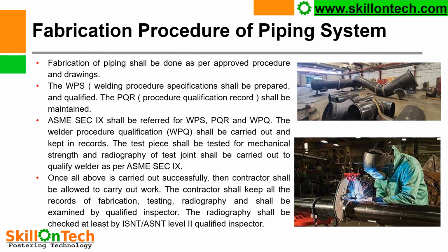Fabrication procedure of piping system. You can see some pictures of fabrication, prefabrication. Fabrication of piping shall be done as per approved procedure and drawing. Without approved procedure and drawing, no fabrication shall be done.